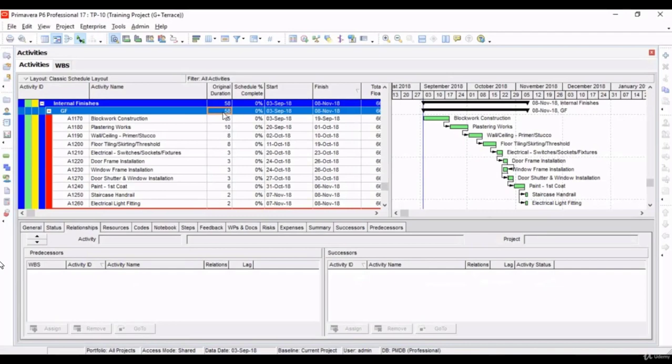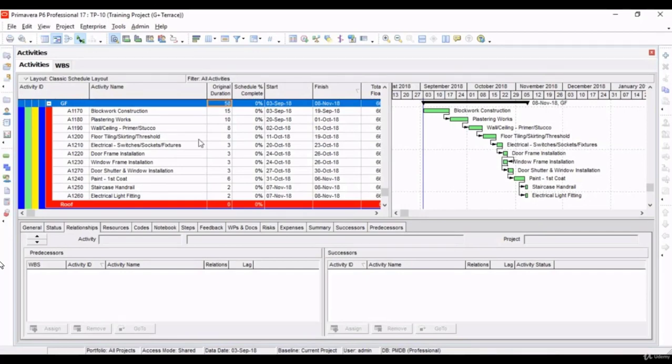This is considering that there is no bathroom, toilets or any other work in the wet area. If there was, that would lead to an increase in duration. So based on the assumption that it is a whole dry area, and we have assumed some productivity and assumed the activities also, this ends the ground floor finishes activity.